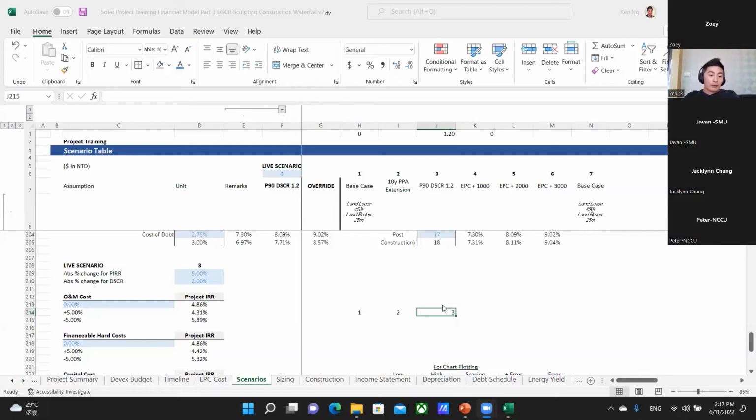In terms of construction risk, construction is actually relatively straightforward for solar plants as compared to offshore wind or onshore wind or coal or gas-fired power plants. There are just a lot fewer things that can go wrong in constructing a solar plant. It's just so much simpler. So as a result, in order to absorb the construction risk, a buyer would need an extra 1.5% return to take on the construction risk.